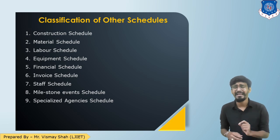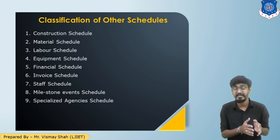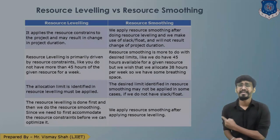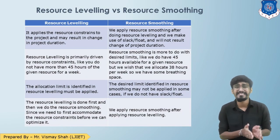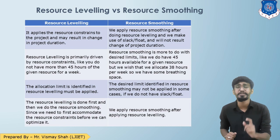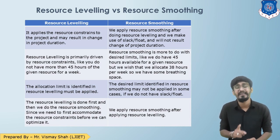Now let us see a very important topic: the difference between resource smoothing and resource leveling. There is a clear difference between the two processes. The first point: while doing resource leveling, the project duration may change. However, resource smoothing is done after resource leveling, and during resource smoothing the project duration does not get changed.